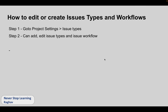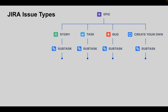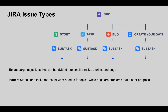This is how we can create issue types and workflows and manage them. We have already seen different issue types: Epic, Story, Task, Bug, Subtask. In general, Epics are large objectives that can be divided into smaller tasks or stories. Bugs are created when issues arise. Stories and tasks represent the work needed for an Epic. Subtasks are smaller tasks necessary to complete a story, task, or bug.